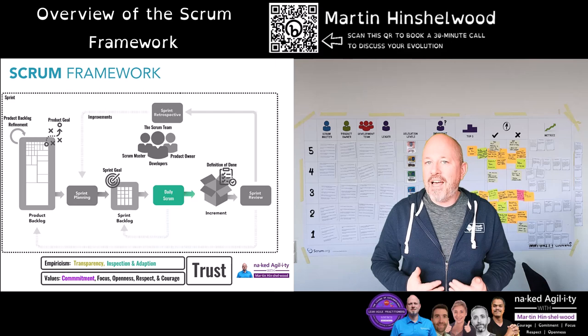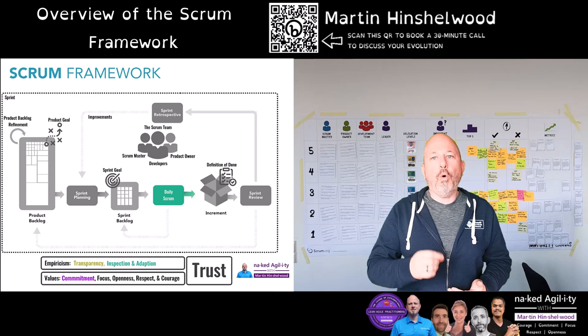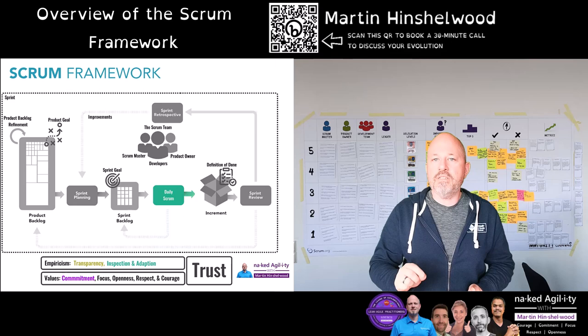Based on the work completed and new learnings uncovered since the last daily scrum, we may need to adapt the contents of the sprint backlog. While this tactical plan may change, the sprint goal remains constant — and only the product owner can choose to abandon the current sprint goal and the sprint itself.